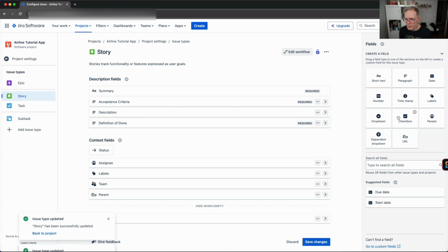So one thing that I could add once more is this INVEST criteria. So if you remember INVEST criteria, it is kind of a litmus test for user story that really tells that okay, you have discussed in your team all the good stuff that is required for the user story. It's independent, negotiable, valuable, estimable, small or suitable, and testable user story.